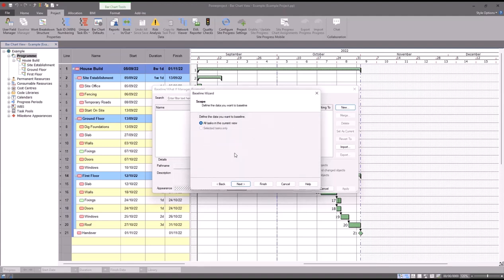One other thing that I would be wary of if you're going to start embedding baselines in the file data as well, is if you're storing files in, for example, network drives or OneDrive storage, and Power Project loses sight of the file data. So it could be, as a really bad example, you could yank the network cable out the back of your computer, for example.